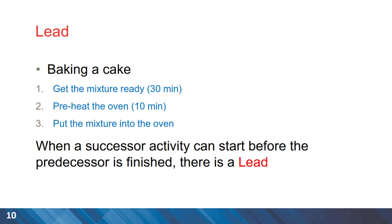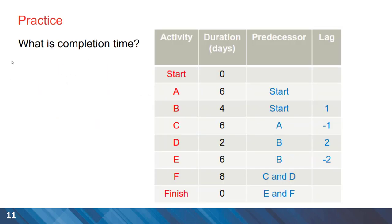And we can have another example, a practice example in here. The negative values are lead and we have them for two activities and we have positive values of lag for other two activities. And we are after the completion time of the project. The final answer here is 19 days.